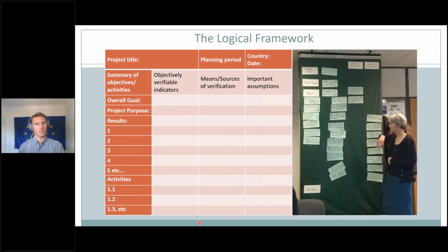The indicators here, you do not have the same indicator more than once. Indicators are either process or impact related. For example, the number of individuals receiving log frame training. This is process related. It tells you nothing about whether the training was successful or not. Therefore, we could include and use an impact indicator such as: 2 years into the project, by T2, evaluation scores of those having received training increased by X%, and by T5, evaluation scores of those receiving training increased by Y%.